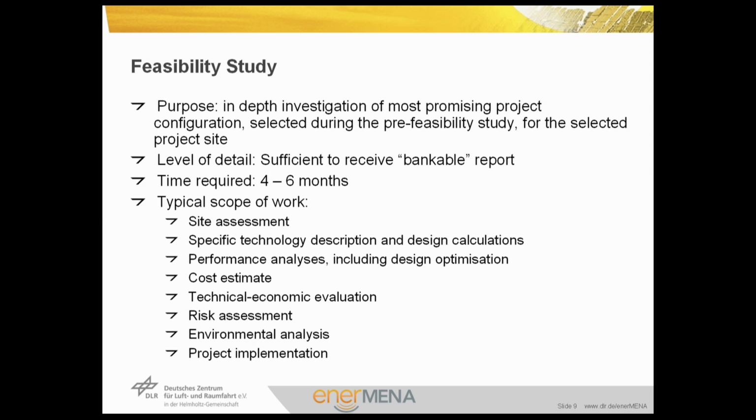In the last lecture, we learned that there are two types of project financing, the corporate and project financing. In any case, there will be lenders, and these have a vital interest that the project is so-called bankable, because these are bankers. And subsequently, the feasibility study, if considered to make the final decision, a kind of go for the project, should have the output that the project is feasible and bankable, because the economics are considered in parallel to technology options and constraints. So the typical duration required to conduct the study is 4 to 6 months.